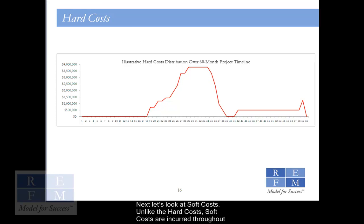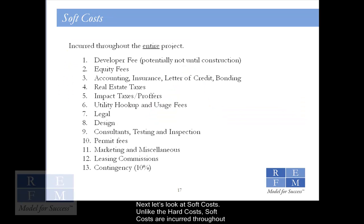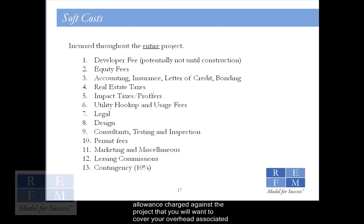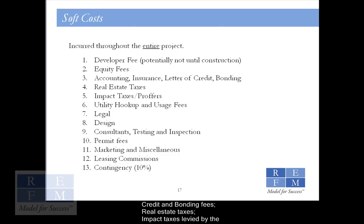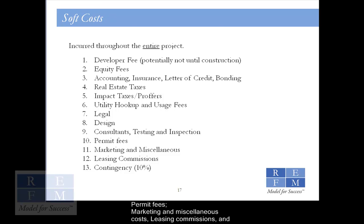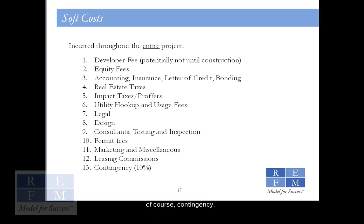Next, let's look at soft costs. Unlike the hard costs, soft costs are incurred throughout the entire project. The major soft cost line items include the developer fee, which is an allowance charged against a project to cover overhead associated with the project; equity fees; accounting; insurance; letter of credit and bonding fees; real estate taxes; impact taxes levied by the jurisdiction, such as a school's impact tax; utility costs; legal costs; design, which includes architecture and landscape architecture; multiple consultants and testing and inspection fees; permit fees; marketing and miscellaneous costs; leasing commissions; and of course, contingency.